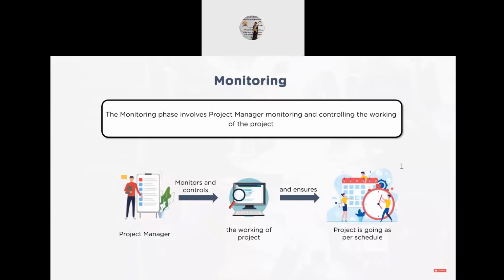Now, the project has to be delivered to the scope that is defined. It should not go beyond that or below that. Similarly, within the schedule made for the project, the deliverables need to be accomplished within the cost budgeted for the project. During the project, the project manager may find certain deviations have occurred, or additional challenges have come in. For this reason, one has to ensure continued monitoring as the execution happens, identify those deviations, and ensure that whenever there is a deviation, there is a correction.